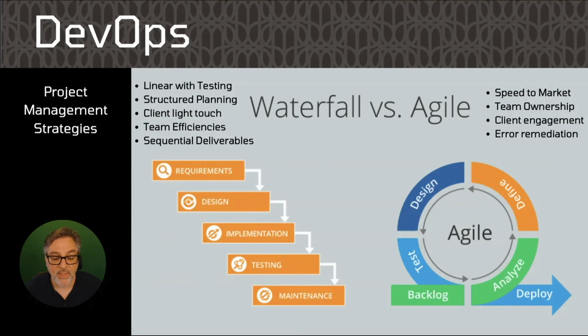What's interesting about that is the idea that any team that's responsible for a work product should be able to be fed during a meeting by two pizzas. That means the team size is relatively limited. And if your team grows beyond that two-pizza size, you should cut the team up and divide that workload into different groups, because you have too many people working on one thing. It should be divided up into smaller chunks of work. We'll talk more about that shortly.